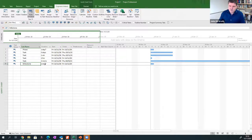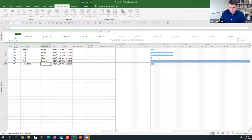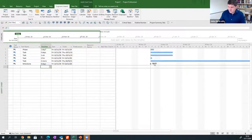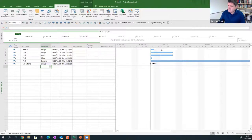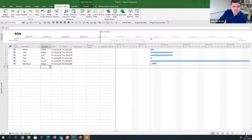In terms of milestones, best practice in Project is to use milestones at the end of each phase by planning a zero duration — just put in zero. You can see on the right it puts in the finish date. A fundamental issue: all the work is stacked to start as soon as possible. Very importantly, unless you set a project start date — which I haven't done yet — Project schedules everything as soon as possible, which is today's date.